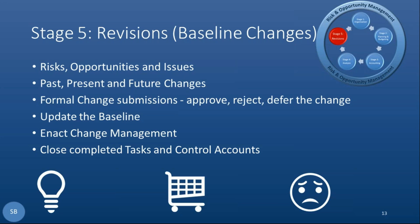Another key element I just wanted to discuss is with earned value, and in particular, once again, if you're following an EIA 748, there's a golden rule, as it were, that we don't retrospectively make change. So if I know I made a mistake in a control account 2 months ago, I actually make the change this month, not from 2 months ago. What this enables me to say is last month's cumulative data plus this month's in period data, by definition, must equal this month's cumulative data.